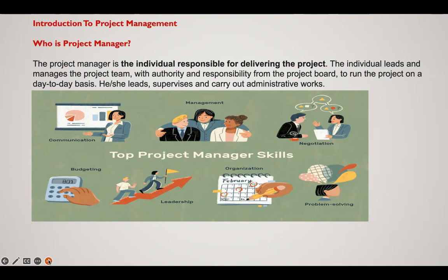Each person that is going to work on it will collect £50 a day. So that is £250. Now, during the execution phase, you now saw 6 or 7 people working on it, and they need to get paid. So your budget, if you have 6 people, you've gone to £300.